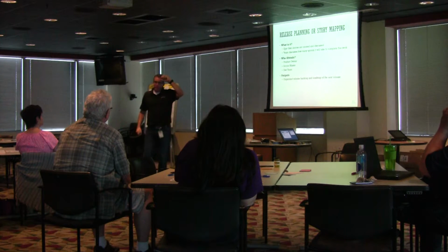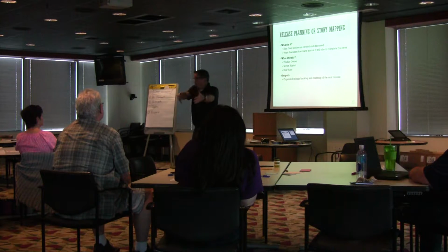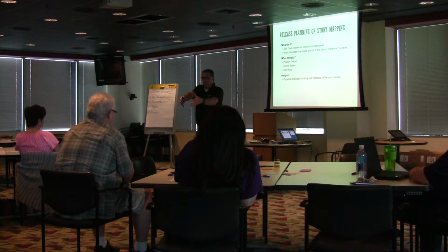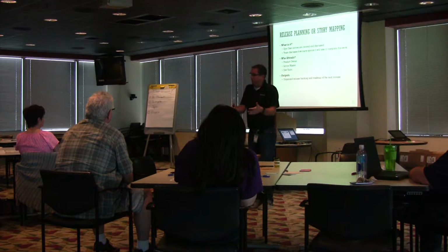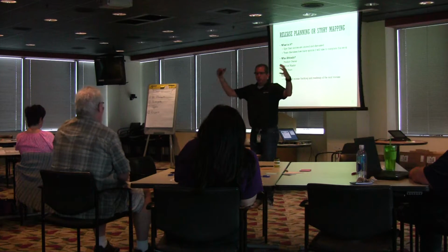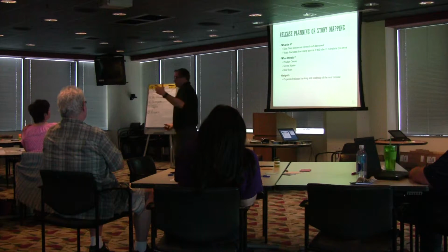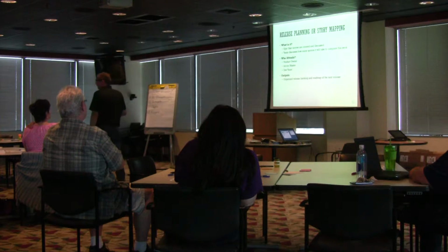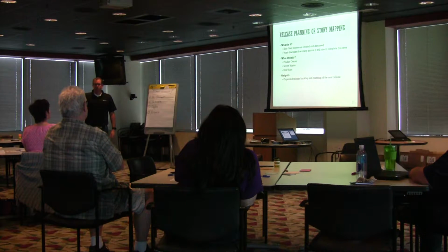What we did on a team that Aaron and I worked with, we did a quarterly plan that mapped this out. For that first sprint that we're about to embark upon, there's a pretty high level of confidence we're going to get that stuff done. And then there's less confidence as I move out on that timeline. Make sense? So I might plan out a rough estimate of what the next release or 2 or 3 might look like, which might consist of 6, 7, 8 sprints, whatever, right? Again, it will adjust, and it's important to adjust that. When you talk with your stakeholders, release plan is a great tool to talk with stakeholders.